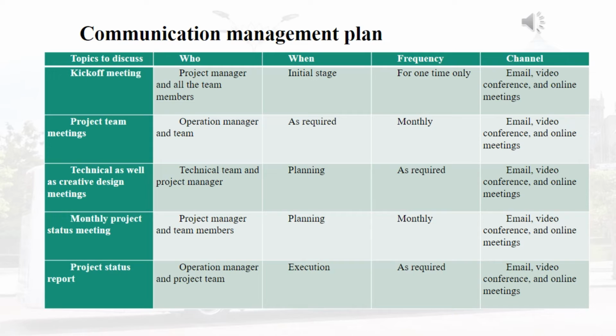Communication Management Plan. The Communication Management Plan is the communication plan that outlines the informational needs of the stakeholders, when this information should be distributed, and how it should be delivered, which covers 5 important steps. Step 1. Define the purpose and approach. Step 2. List goals and objectives of the project. Step 3. Research and assign roles. Step 4. Determine method of communication. And step 5. Pinpoint high-level communication.